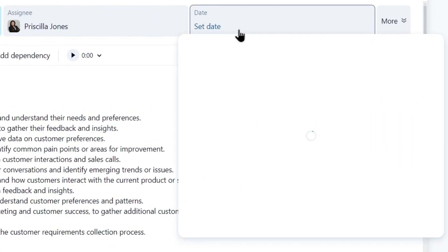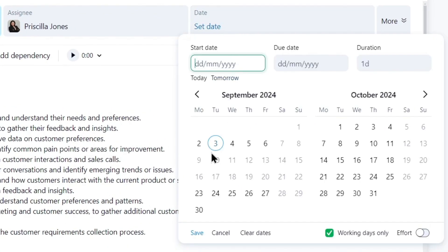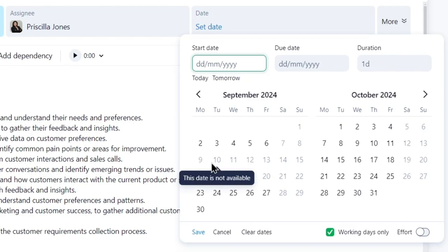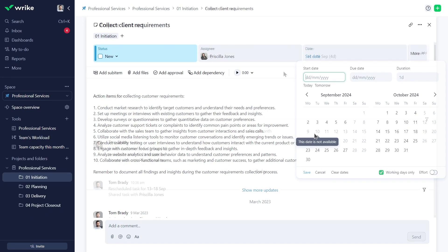Now Priscilla's days off are grayed out and can't be selected for tasks already assigned to her.